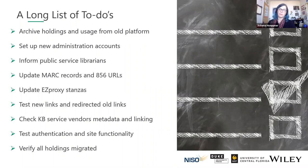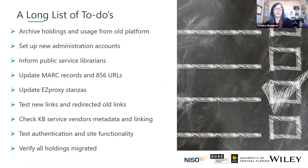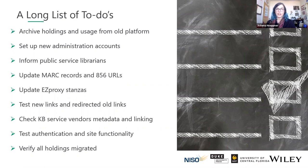Communication is something we want from publishers, but we also want to see publishers communicating to other service providers like knowledge base providers, OCLC, EZproxy, and Open Athens — so that we are not the only ones saying to Ex Libris: does your knowledge base have the new URLs in the discovery for linking? After the migration, we need to verify that holdings are all moved and functionality works as expected. There have been several migrations where we discovered that content did not migrate as expected, and old titles are now represented in a new way.